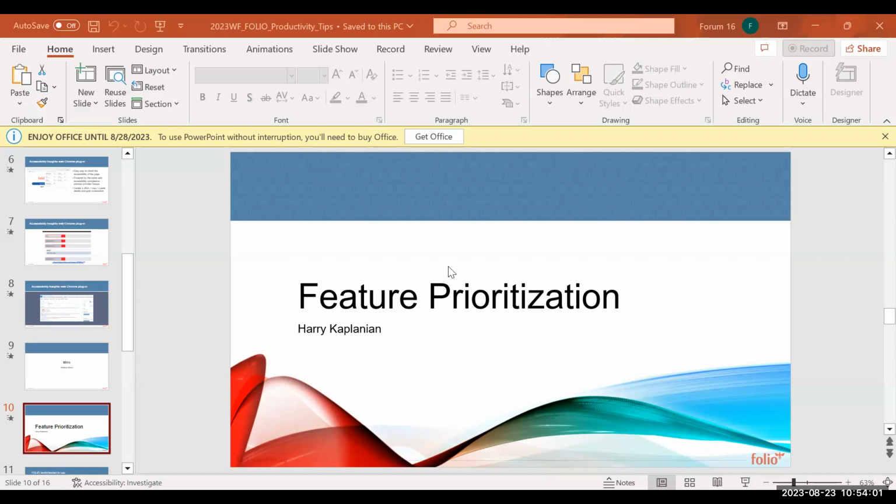So this is one that I've actually used a lot, and it's called WSJF, right? It's the weighted shortest job first. Basically, jobs are prioritized based on cost of delay. In WSJF, the total calculation is the cost of delay divided by the job duration. As you can guess, the longer the job is, the lower in priority it becomes, because the payoff will tend to be quite low, right?